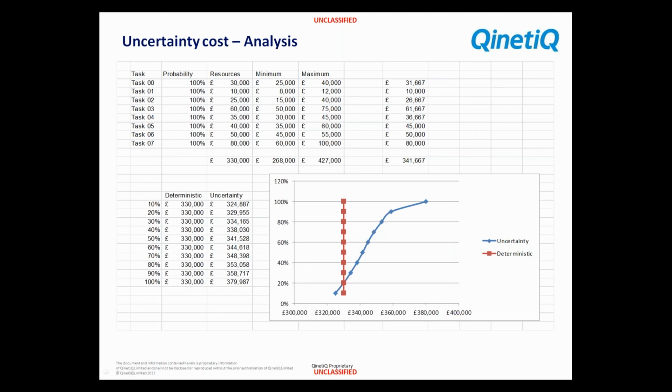Any scenario, any uncertainty in those estimates, he's going to be on a winner. He's got 100% confidence. Conversely, if we go down to £320,000 and give him a budget of 320, he has absolutely no chance of bringing this project in on budget because all of the uncertainty is to the right. It all falls to the right of £320,000.